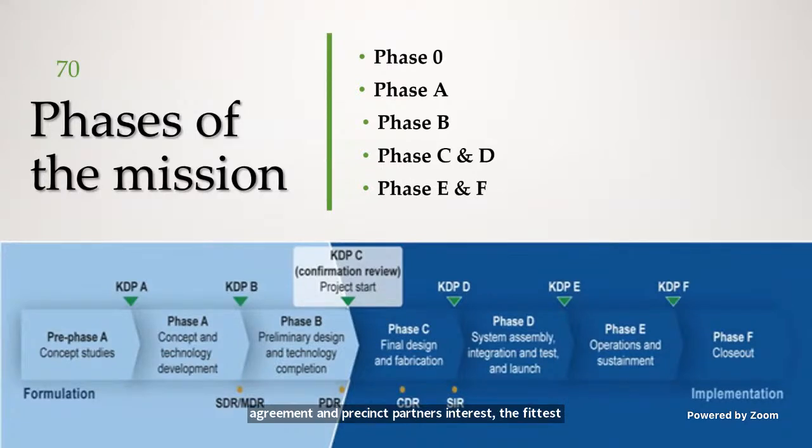It's a relatively low-cost paper exercise designed to expand the basic idea and confirm that the project is feasible. So during this phase, the principal investigators shall define the overall experiment plan. So this phase includes technical specifications, coordination board, and simple simulations. The next phase is phase B.